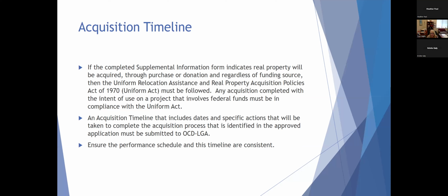This process does or can be a timely process. So I suggest that if you are going to be involved in an acquisition, that you begin as quickly as possible. An acquisition timeline that includes dates and specific actions that will be taken to complete your process that is identified in the approved application must be submitted to OCD-LGA for review. Ensure that your performance schedule and your acquisition timeline are consistent with each other.